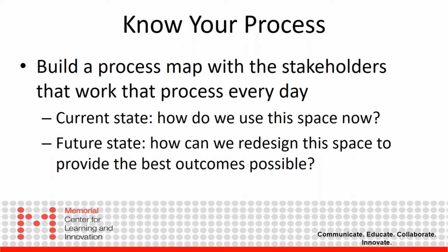In healthcare, I know that can be difficult because it can be hard to pull those care providers off of the floor, whether due to staffing issues or where you're geographically located. But we found there can be a disconnect between what leadership thinks might be happening and what is actually occurring. A lot of that comes out as you build a current state process map of how we are utilizing that space now. How are we flowing through that process? How are patients flowing through that process? And how can we make sure that is accounted for within each of our models?